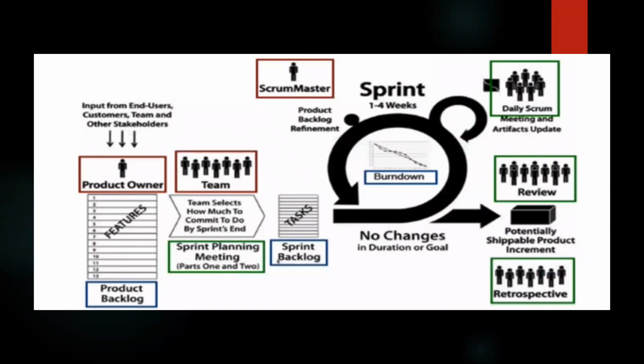A sprint refers to the fixed period of time in which the Scrum team does sprint planning meetings and works on the sprint backlog. They start drawing a burn down chart, and they will have a review once the sprint has been done. They will again show it to the client and attend the retrospective and note the points, and then they come back to the product backlog items, pick up another chunk of items, and start another sprint. This is a repeated process.